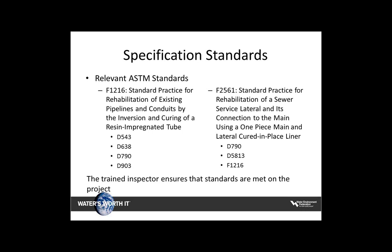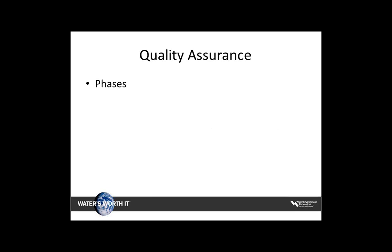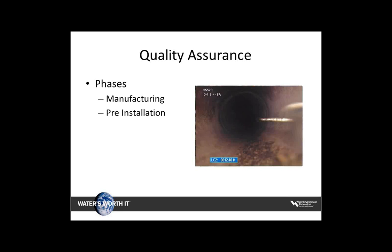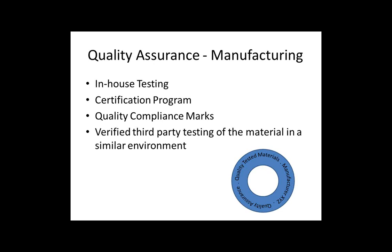There are various phases of quality assurance on a project, starting from manufacturing of the product or technology, to pre-installation, the installation phase, the post-installation phase, and beyond. During the manufacturing phase, it is very important that in-house testing is conducted. It is highly recommended that the manufacturer have a certification program in place to certify and validate all of their technologies and materials. Quality compliance marks should be placed on materials that have been tested and passed the certification program. Also, verified third-party testing of the material should be readily available for submittal purposes.